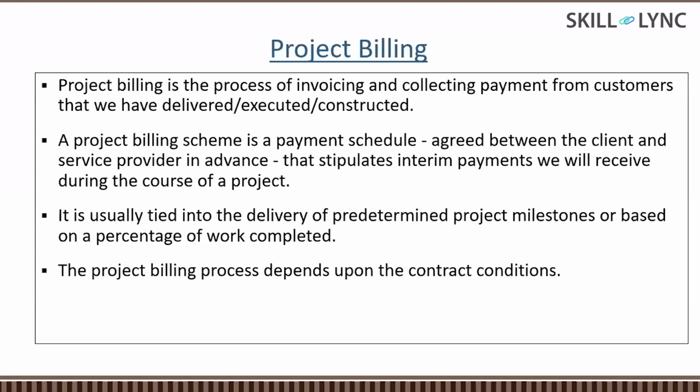In many projects, it is on an item rate basis. So whatever quantity you execute on a periodic basis, you will be raising the bill to the client. And if it's a lump sum process, then milestone payments will be there, and then they will have the bills. So guys, any question, please put it in the chat box.